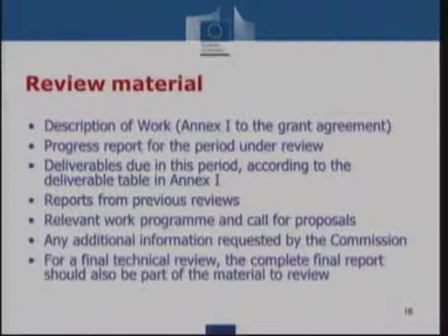So the possible review outcomes are: we allow the project to continue without modification of the Annex 1, or with minor modifications. It can also be that we consider that the project can only continue with major modifications. With the major modifications, you can see that this will require an amendment, which will be initiated by you. But of course, from the review report, it should be clear in what sense the description of work should be modified.